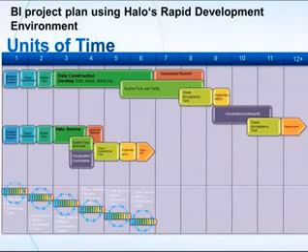What ends up happening is that there are ways that we can use agile development to reduce that cost even more. And this is where a lot of your ROI is going to come in. If instead of using a traditional waterfall method, you end up using an agile method, you can start to do sprints, whether they're a month long or a week long. It depends on how agile your team really is. And if they can start to put out dashboards immediately that can be used to change your business processes and start to generate revenue, if that's your key indicator, sooner, then you can start to pay back your investment while you're in the development phase.